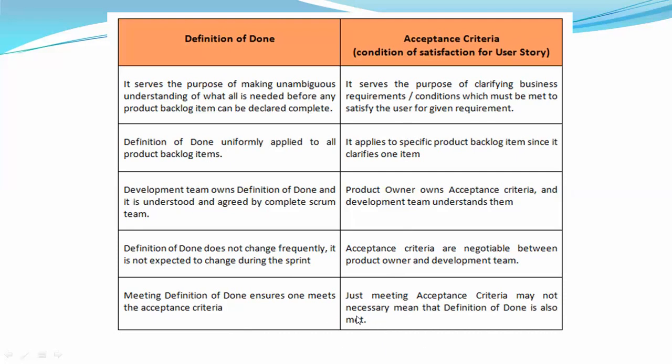In the meantime, I will just explain this point. Just meeting the acceptance criteria may not necessarily mean that the definition of done is also met. Inside the definition of done, one point is acceptance criteria, correct? There are more points. So always remember, only meeting acceptance criteria does not mean that the definition of done is met.